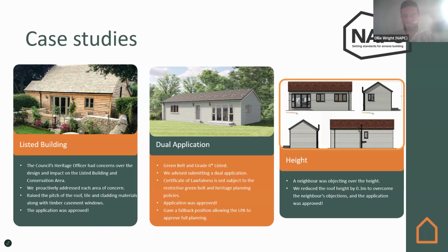Fantastic. What a result for the client. What the high courts have said is that if an application is going to be approved through a different form of legislation, so the Caravan Act in this case, that then acts as what they call a fallback position. Now, the fallback position is then a really strong material consideration in the annex application. And what the courts have said is, if they're going to go ahead and build it anyway through a different form of legislation, you should take that into account when you're making the decision on the annex application, which was going to be refused.